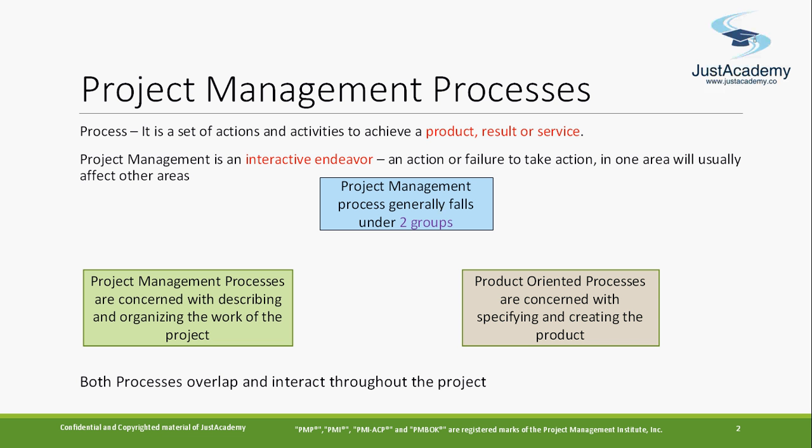Most of the time, the project manager, is just like a 6 month, or they don't create this quality management plan document or the cost management plan. Within cost management, there are a lot of activities: how to get funding, what's the plan for that, when, at what moment, at which time, like after 1 month, which money, how do I get that money, who is going to source it. That also needs to be planned; it can't just be kept in their mind. It has to be documented somewhere. That is also called a plan. That's a cost management plan, okay.